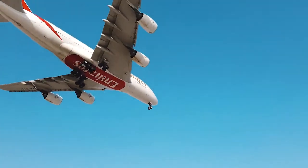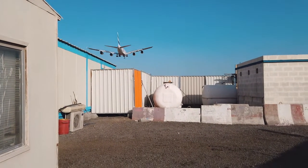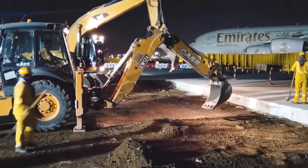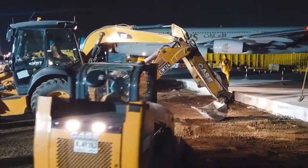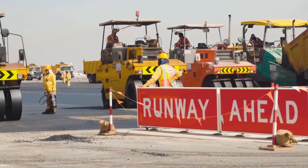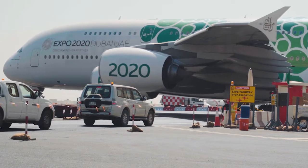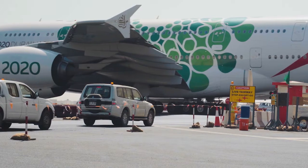During the refurbishment of the South Runway, the North would remain fully operational with over 800 aircraft movements daily. All this traffic would have to use 3 crossing points which dissected the main construction areas. It created a unique working environment that placed enormous pressures on all those involved.